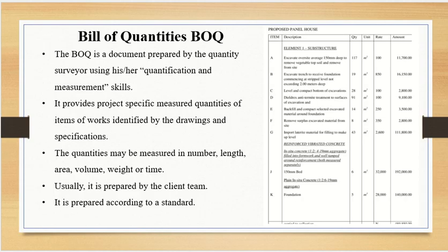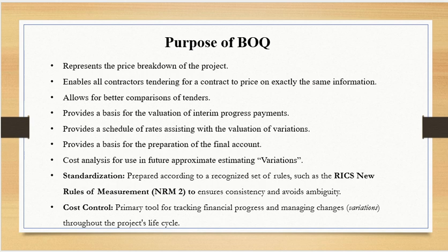The other important part which we are concerned about is bill of quantities. It's in tabular form. It shows you the quantities of materials, their units, and their cost. And usually it is done for each item. So you can use this bill of quantities for calculating the price of your contract. You can use it for payment of the contractor. You can use it for monitoring the progress of the work. If I spend this much amount of money, how much work is done? And you can also use it in the end for finishing the contract. So the contract is finished when all the quantities are done.